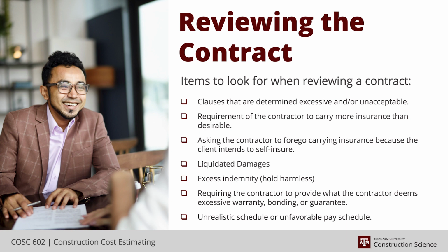Touching on these particular items and talking about the contract, I know, is kind of tangential to, well, we're talking about putting an estimate together here, but the decisions behind how to handle each one of these items should directly impact the estimate you submit. If you've got liquidated damages, are you going to add money into your contingency bucket to mitigate some of that risk?